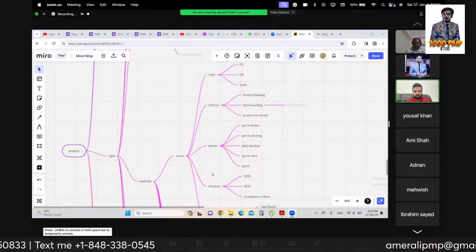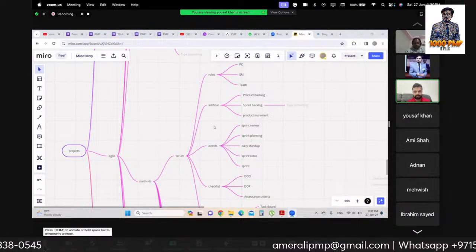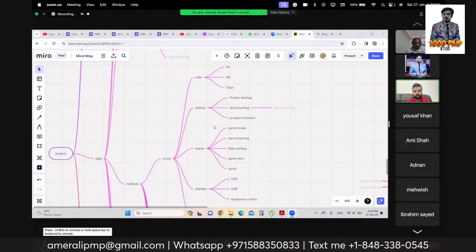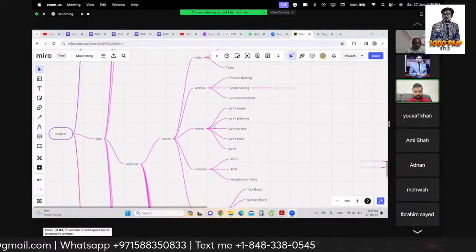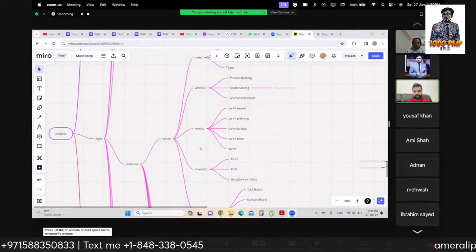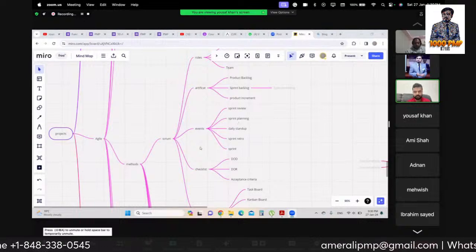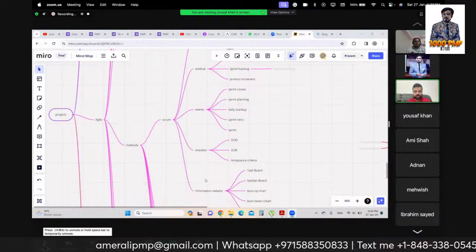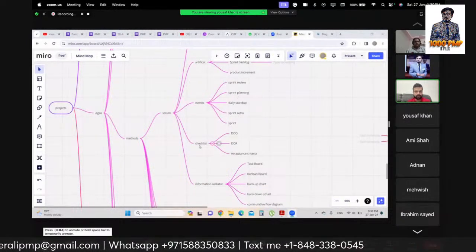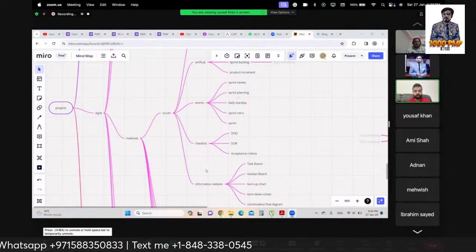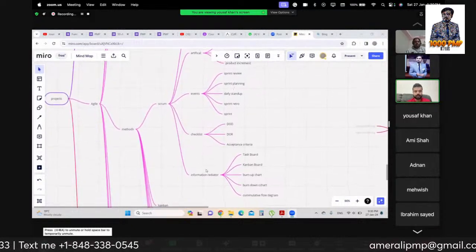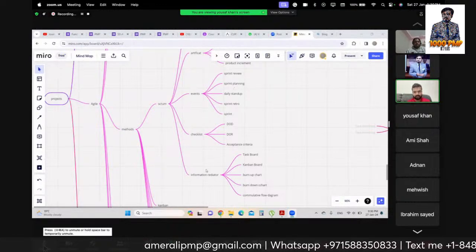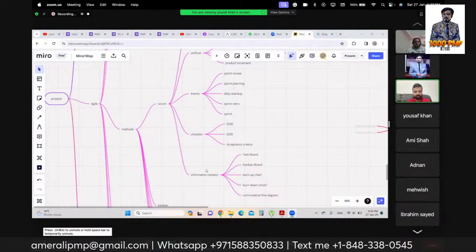In Scrum, there are 3 roles: product owner, Scrum master, and development team. There are 3 artifacts: product backlog, sprint backlog, and product increment. Then 5 ceremonies, like events: sprint planning, sprint, daily stand-up, sprint review, and sprint retrospective. Normally we use the Scrum practice. The Scrum process goes: product backlog, sprint planning meetings, sprint backlog. Then the sprint takes 1 to 4 weeks, normally 2 weeks, and the daily stand-up happens, which I already explained.